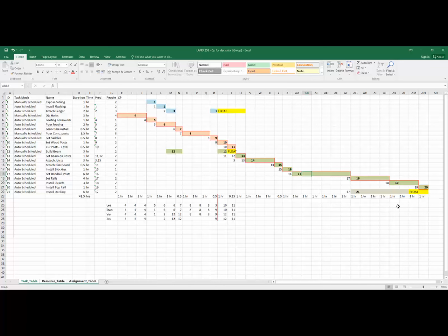All right, this is the project you're going to complete. This will give you the total number of hours that are going to be allocated to this. You won't be paying half hours, but if everybody finishes a 6-hour day, that's all that you're paying is for 6 hours. It all depends on how it works at the end of each period. So this will be the calculation of hours as well as the duration of the project, and that will all be added to the actual bid sheet that you're going to put together for this project.